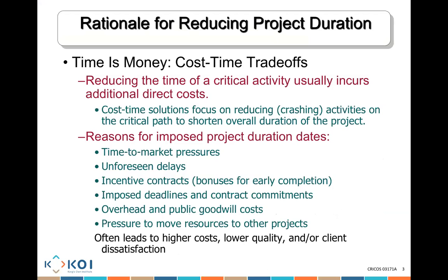Cost-time solutions focus on reducing activities on the critical path to shorten the overall duration of the project. So we need to think about how we could reduce the cost of the project, but at the same time reduce the duration of the project. You need to monitor a lot of the costings. You need to monitor what we call the direct and indirect costs to try to finish the project earlier.